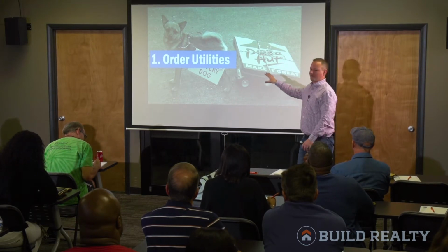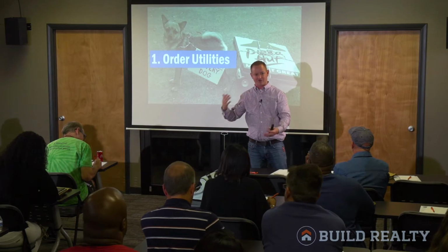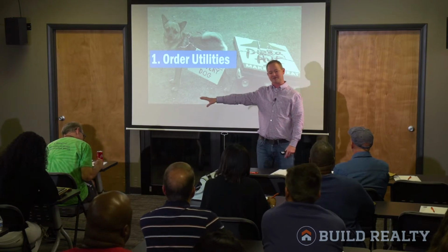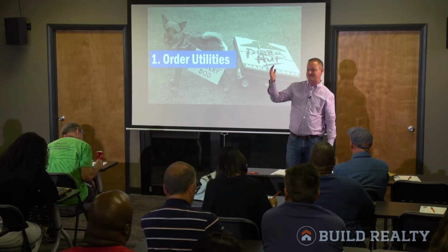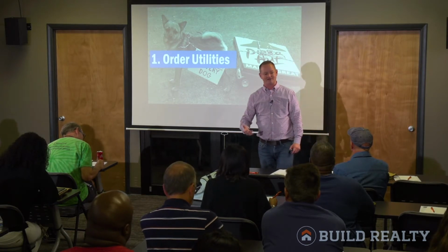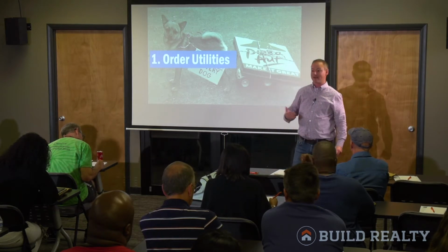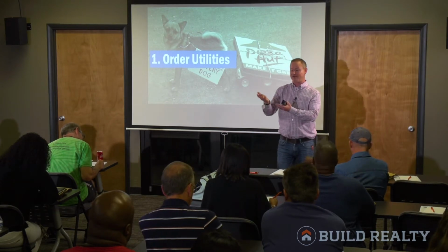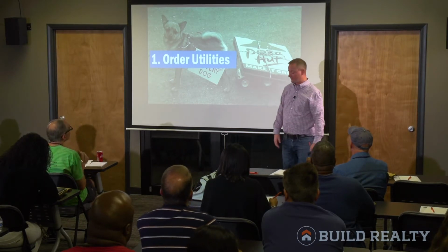So a week before the closing, call and order utilities. You want to try to get them turned on or switched over into your name. Find out if there are any outstanding bills. It's a simple thing, but you never know. There may be a massive sewer bill for a couple thousand dollars that stays with the house. Or maybe that's when you find out that it has to be hooked up, that we're requiring it be hooked up to septic or public water. It's an important part before you close.